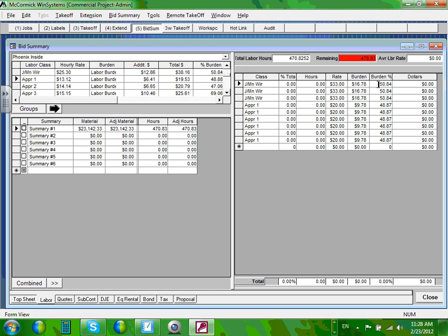Where would you get the burden? The company has to decide what the burden is. If you're doing IBW, probably will go change these, the 33 all the way to 50. What is it? 54 in IBW here, 292, 54, 0 burden, because that includes the burden, and move on. Can I have thumbs up, Chad? We got the labor. We labored that baby.